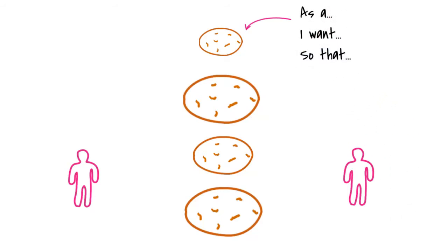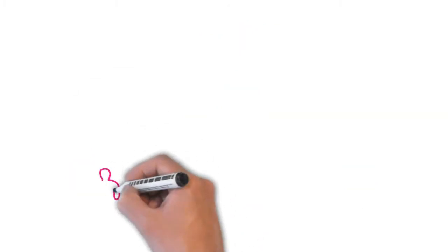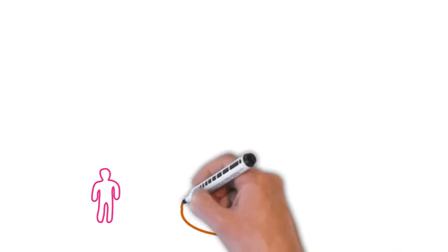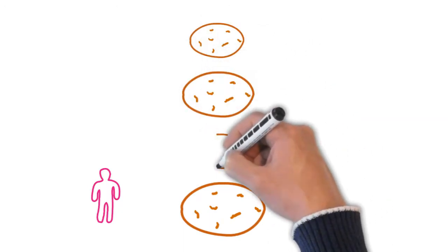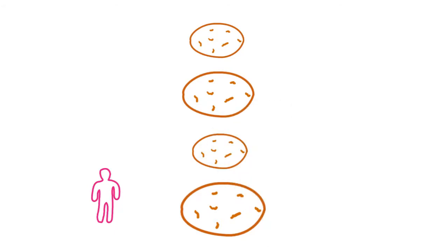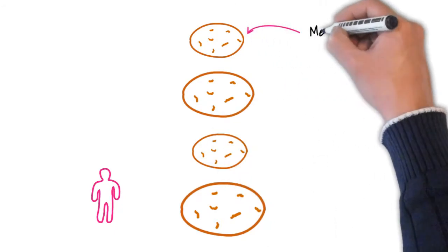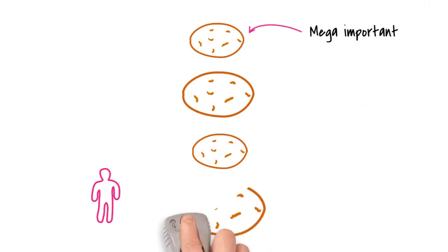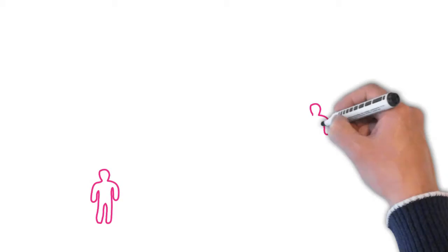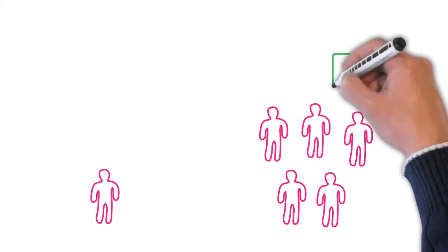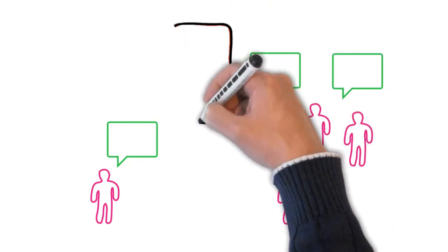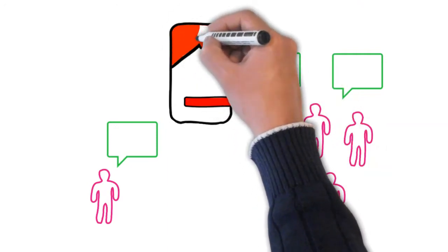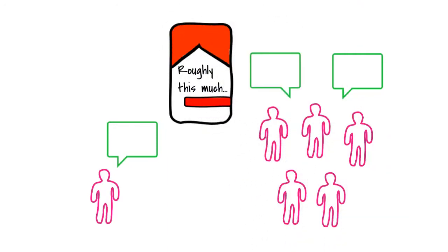Now that's out the way, let's focus on sprint planning itself. In the first hour, have your product owner outline the most important chunks of work to get started on now. If you're working on a project to improve a frontline service, for example, it could be that conducting a bunch of discovery activity is the best place to start to ensure you really understand the challenges and needs of service users. Having understood the stuff that's most important and provides the greatest value, the Scrum Master facilitates a discussion between the team and the product owner about how much the team think they can accomplish during the sprint. At this early stage, they don't really know how quickly they can get stuff done, so this needs to be done on their collective gut feel.